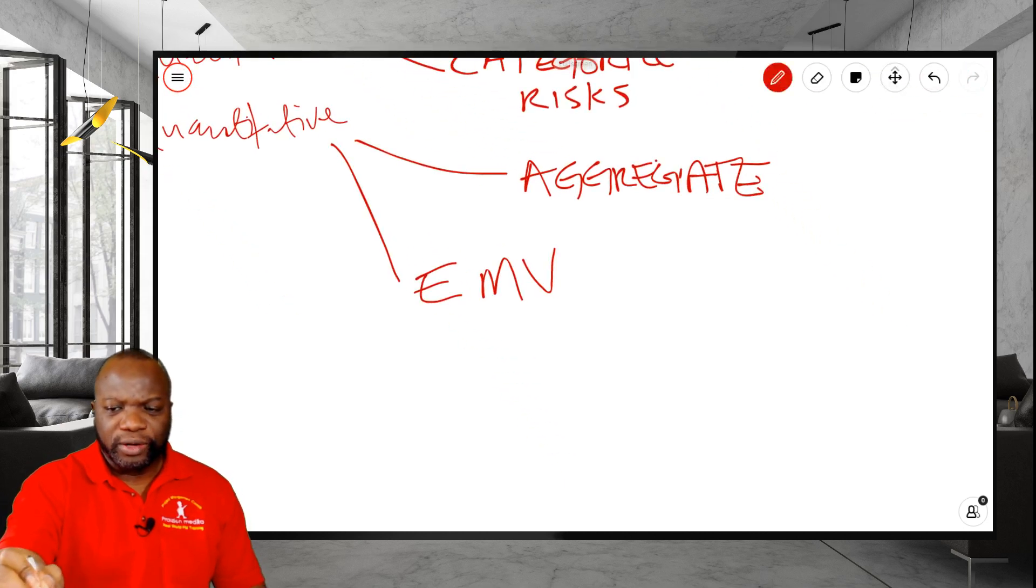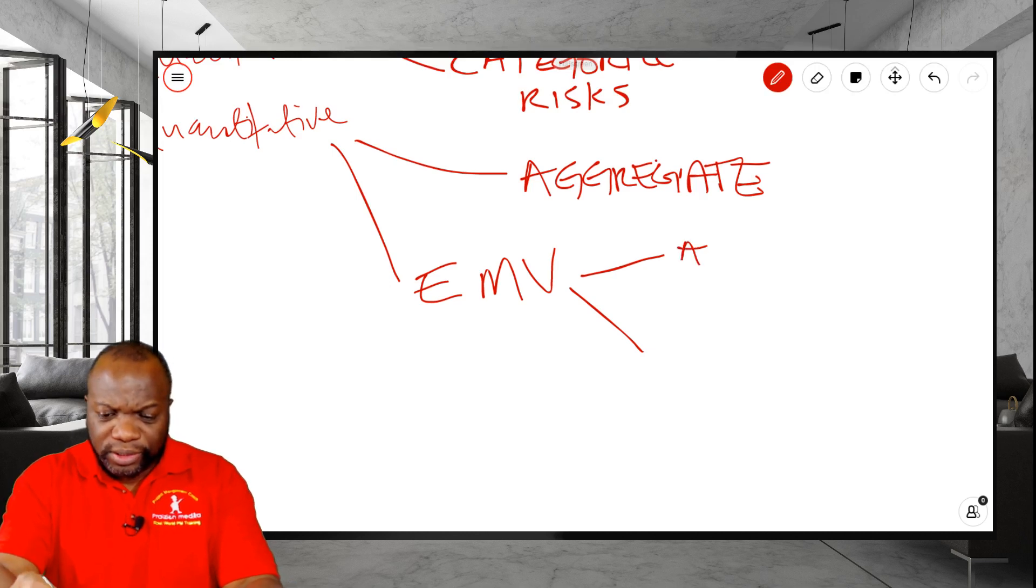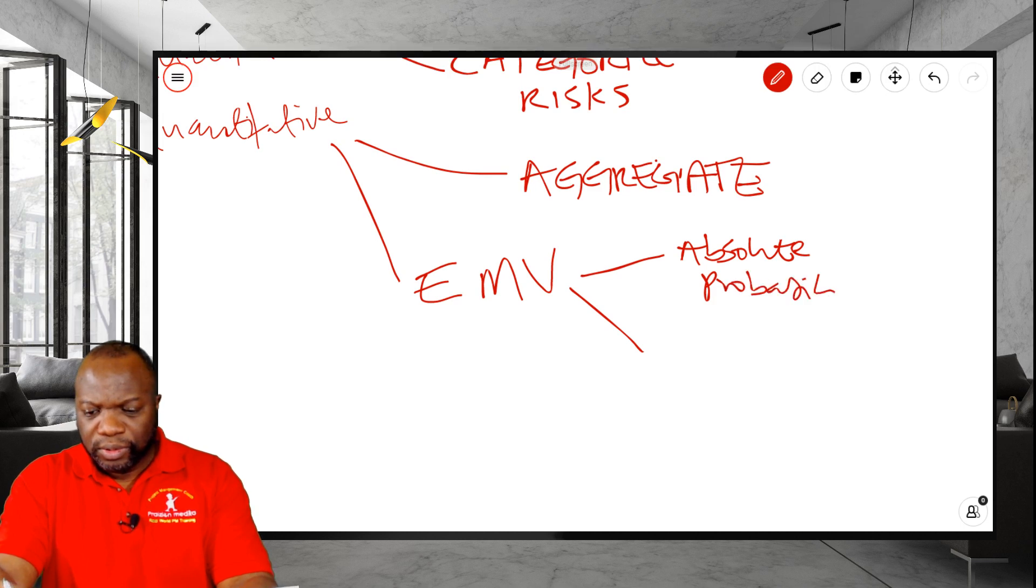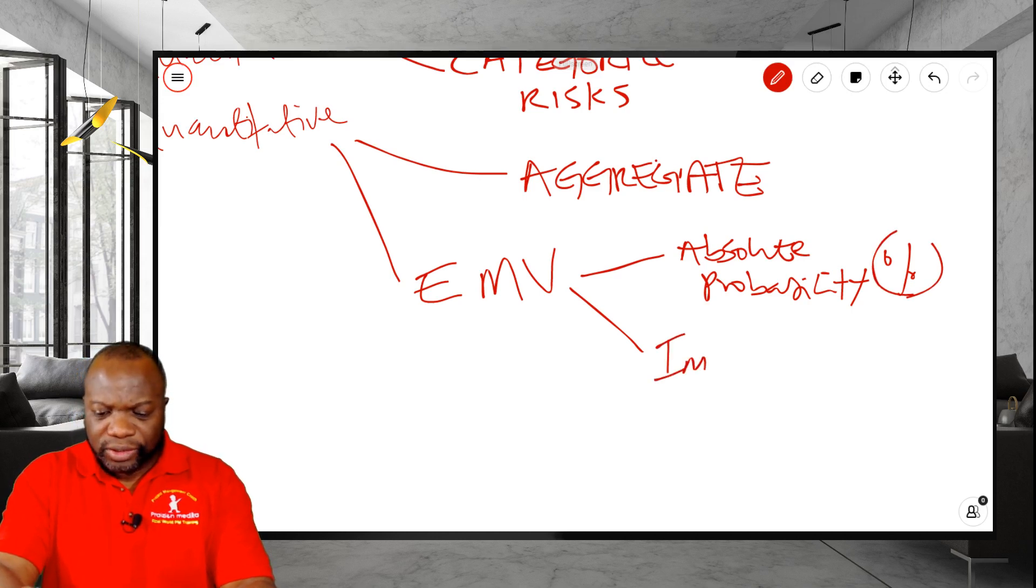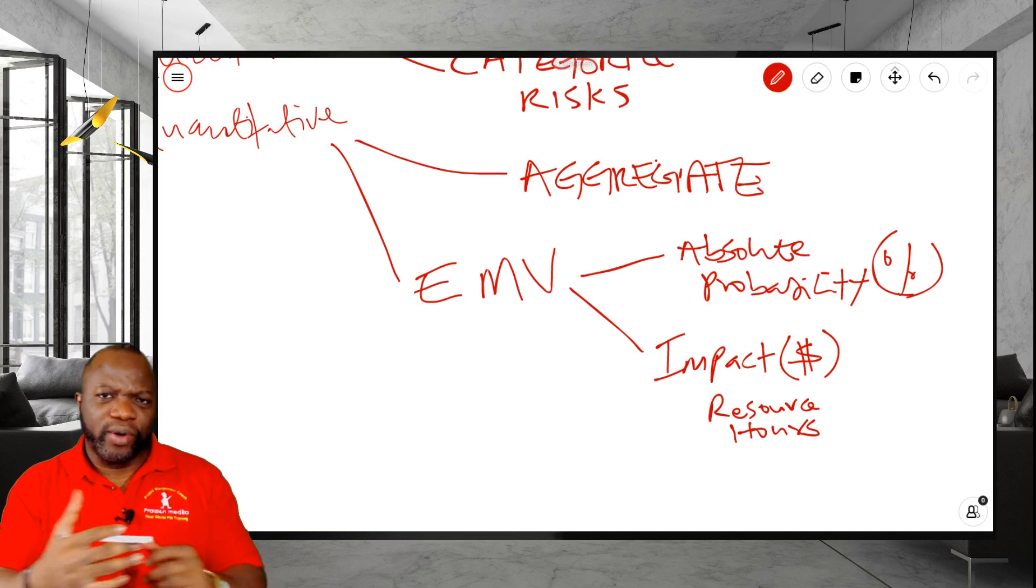Now, EMV should not be confused with scoring risks. Is it similar? It is, but it's not the same thing. For EMV, we are using what I would call the absolute probability, probability in percent, and we'll be using the impact. The impact is not going to be just any old number. The impact is either going to be in dollars, or it's going to be in resource hours, or some other quantitative measure.